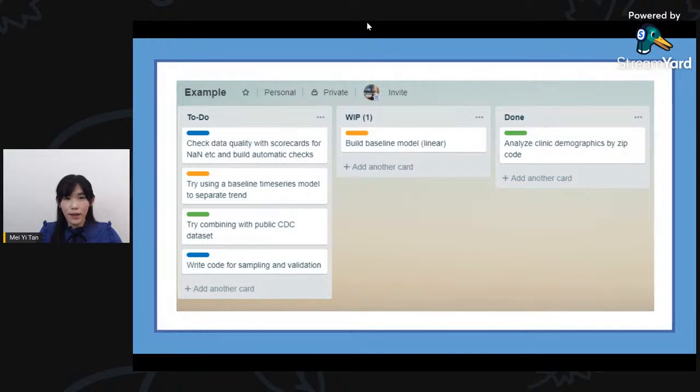At least you spend a few days on requirement gathering, and then after that you need to gather the data, see what data is needed, and then start to build something, maybe a very first draft, a first version of your dashboard or first version of your model to do predictions. So the range will be between 2 to 4 weeks.